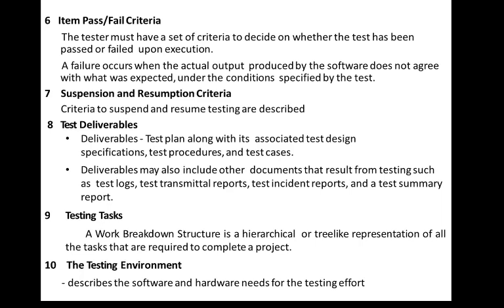The high-level tasks are set at the top of the hierarchical task tree, and the leaves are the detailed tasks, sometimes called work packages, that can be done by one or two people in a short time period, typically 3 to 5 days. A WBS is used by the project manager for defining the tasks and work packages needed for project planning.